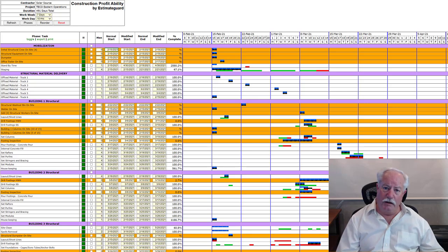if I need something on site and it's not here because they haven't ordered it or just made those arrangements, then I'm going to get it here and you're going to pay for it. And at the end of the project, you're going to have to settle up with them. And so we agreed that that would be our path forward.